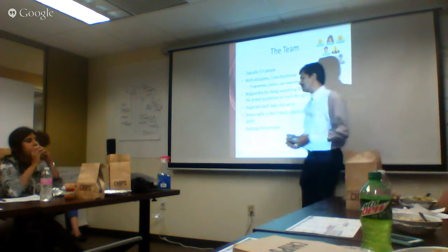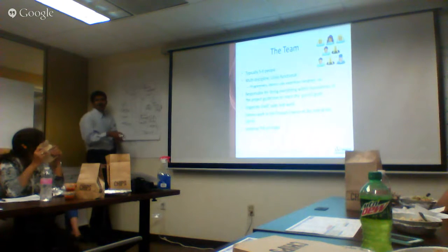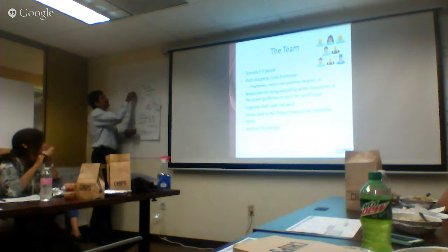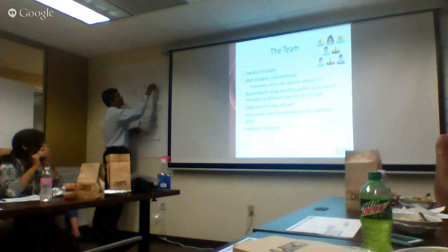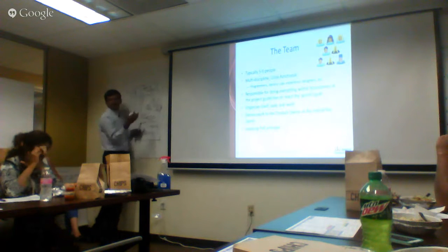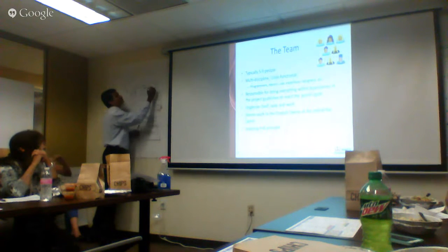We'll talk about the sprint backlog. I think we'll talk about the product backlog. Whatever features from the product backlog that we select for a particular sprint become a sprint backlog. Sprint backlog is made up of what? Two things. It's called user stories. You can map it to the requirement in the traditional way, but the user story is what the user is asking, what features the user wants developed. So it's smaller.